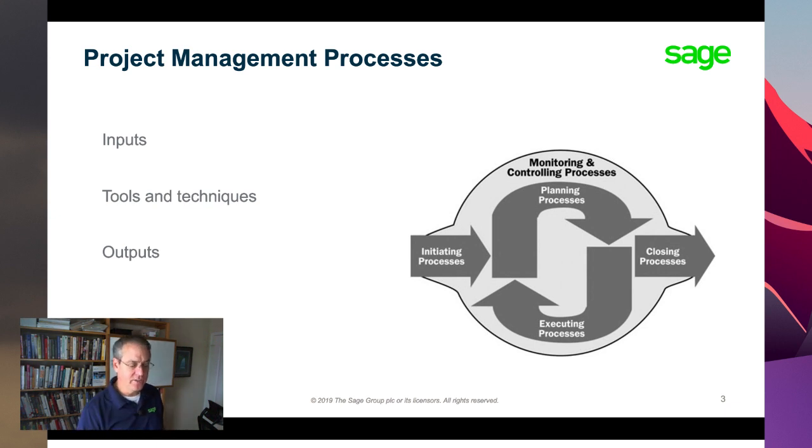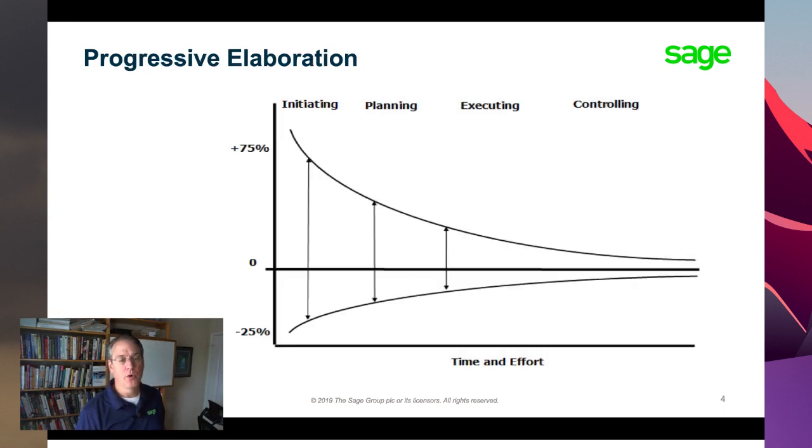All right. Next up, I want to show you again why this is so important. This graph illustrates a characteristic of projects: they are said to be progressively elaborative. In other words, we learn more and more about what we're trying to do as we move through the project itself. This is why the 0 in the middle here is the deviation from the baseline, the original prediction of what the costs and or the benefits were going to be. So we're going to see some deviation based on this.